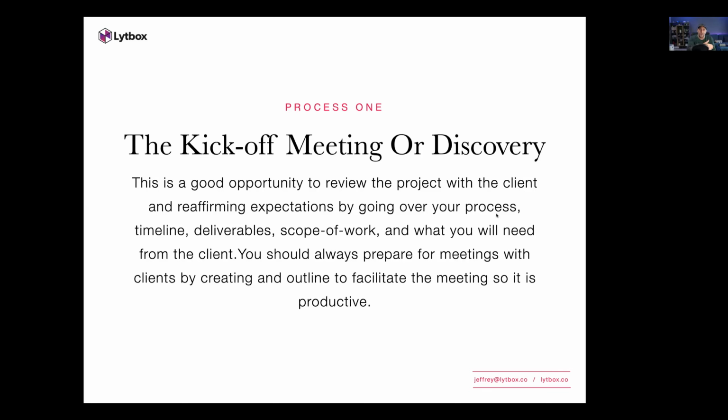We're going to start off with research. We're going to go into design this week. We're going to go into development. We're going to go into testing. Whatever that process is for the project that you agreed on, you're just going to review it again. And then you're going to review the timeline, the deliverables, the scope of work, and also whatever you need from your client.